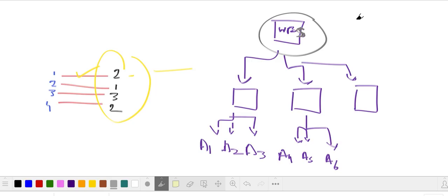Do you remember the chapter of integration, where we were talking about what happens if something has been missed from the WBS? We would go to the integrated change control board, and they're going to fix that for us. We're just going to send the change request to them, and they're going to fix that up for us. If they approve it, we're going to put that activity as a part of the WBS here. If not, then we will just put that in the change log, and that will be there. And we talked about that.